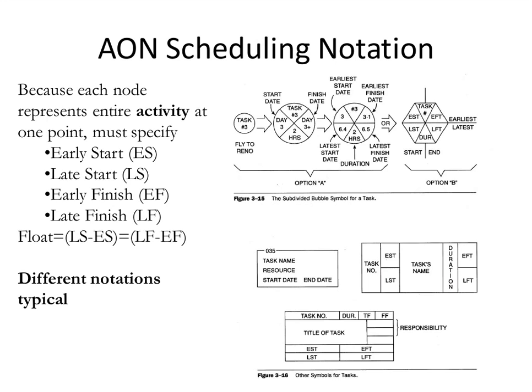So we're going to associate with each activity those quantities, and I'm going to come back to this notion of float, or slack, associated with activities, by just noting it's the difference between the late start and the early start. If this is the earliest you can start it, and late start is the latest time you must start it in order to finish on time, you actually have some latitude, some give, some slack, some float in terms of when you start it.